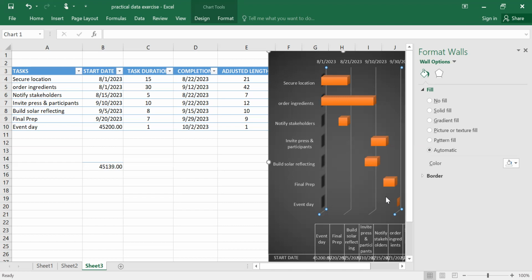And beyond my boss, there are people outside there, all other stakeholders. I also need to engage them appropriately. Remember, sometimes you may decide to be connecting your stakeholders through email. Yes, you send them email. And some people check even 6 or 5 days before they even check their email. So you revert. Besides emails, you check: when you send email to X, how long does it take to respond? If it takes long, then you stop sending emails, and use the phone call.